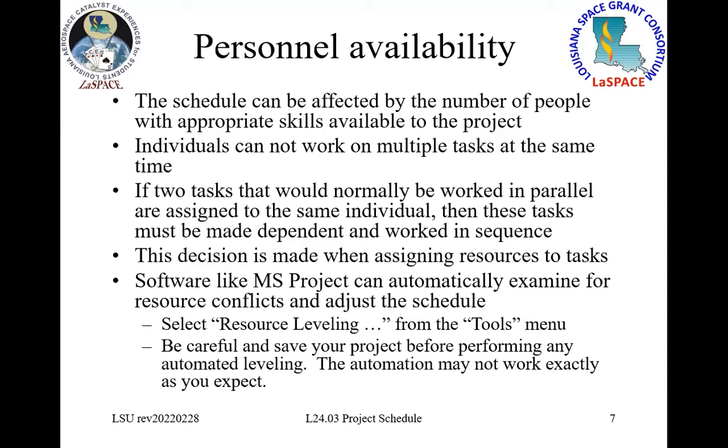Personnel availability, right? I can't emphasize this too much. You need to be able to take this kind of stuff into effect. You cannot work on multiple tasks at the same time. You can only assign an individual a task at any given time, right? And that's the way that you need to work it in the project. Now, during a given day, that individual may work on task A and then task B. That's fine, but it's got to be clear that it is done sequentially.